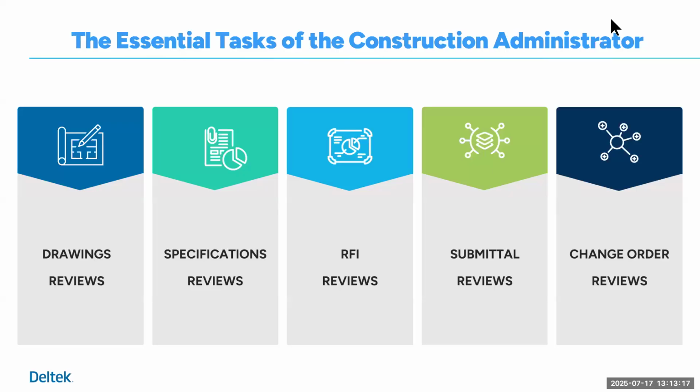So please include in your schedule for the project time for the construction administrator to review drawings and specs. Because once these drawings and specs are released for construction, the role of the construction administrator, the CA person, they're in the spotlight.